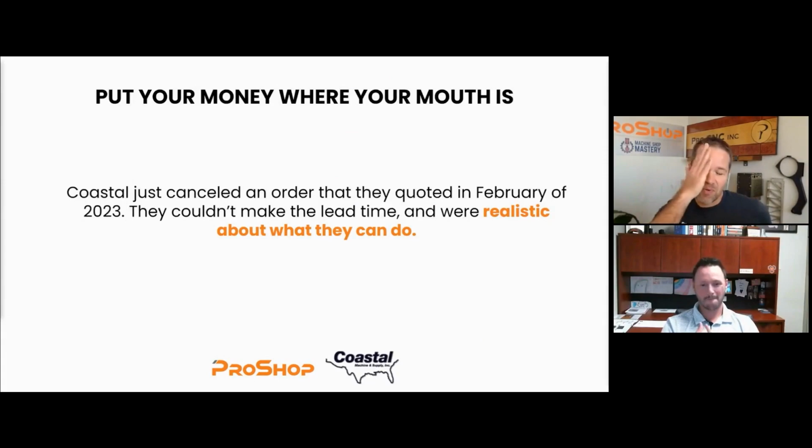So when we were planning for this, you mentioned you just recently canceled an order, maybe earlier this year, but tell us where that came from. Yeah, so we had an order come in that we probably quoted a month prior to the customer PO coming in, and it went through a normal process of contract review, planning, and everything. And then once it got into planning and we started ordering material and all this stuff, we realized there's no way we can hit this date. So we had to go back to the customer and say, look, we either have to have this delivery date or we just can't take the work. We're going to have to decline it.